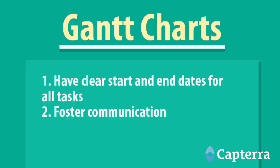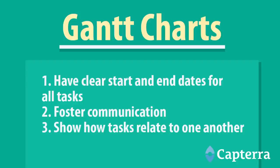Secondly, they foster communication across the team — they let everyone know who is doing what at what time. Thirdly, Gantt charts show how tasks relate to one another. In other words, they force their creators to figure out the sequence of tasked events and assignments.